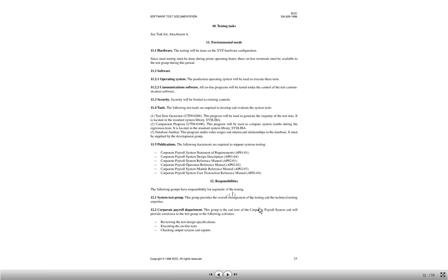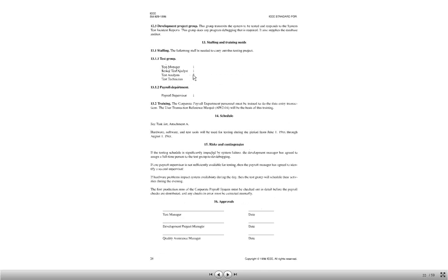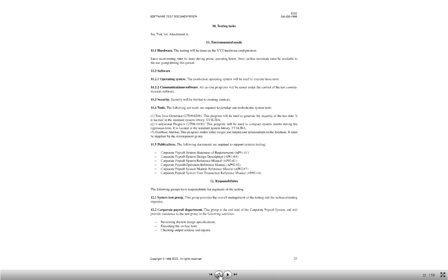And then finally, the responsibilities, in terms of what are the different groups that will take care of what modules. So let us say if the installer testing is to be taken care of by the non-core team, then that needs to be listed, that it is the responsibility of the non-core team. Similarly, digital certificates or security certificate testing, if that is handled by another team, that needs to be listed over here, things like that.